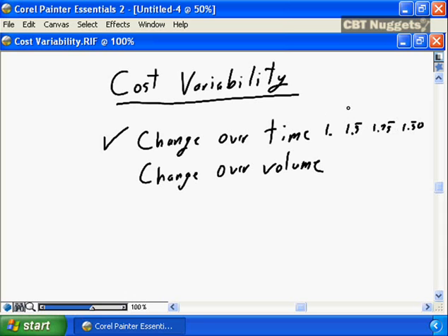What control do you have over the cost, i.e. what control do you have over the effect inflation or deflation is going to have on your project costs? A lot of materials will get expensive over time as a result of inflation. If you need to buy lumber, if you need to buy gasoline, if you need to buy most commodity products, over time inflation is going to increase the cost, and gasoline in particular seems to inflate in cost at a great rate, far higher than inflation. So how much control do you have over cost? Other components often deflate in costs over time, and technology being a prime example of that.